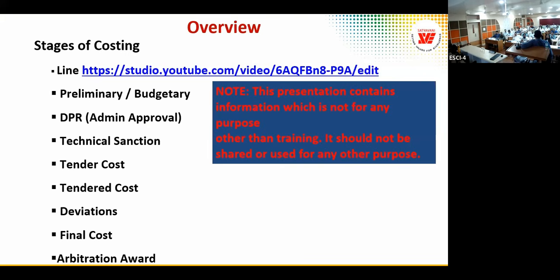That's not happening. You are having 3 consultants in most of the big projects. You have a DPR consultant, you have a detailed design consultant, you have a project management consultant. 3 stages. According to me, it should be all the same. One consultant who will prepare the DPR, who will get the technical sanction done, who will prepare the tender document, and who will implement the project with the contract conditions that are there in the tender document. So there are 3 stages. DPR, tendering, and then execution.